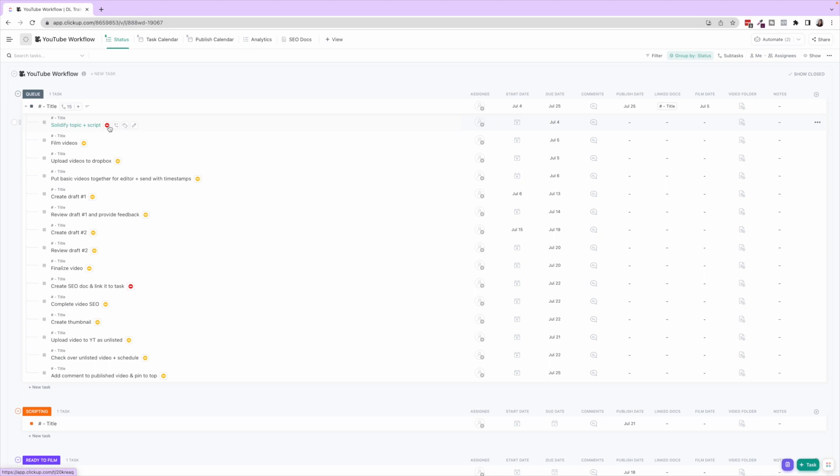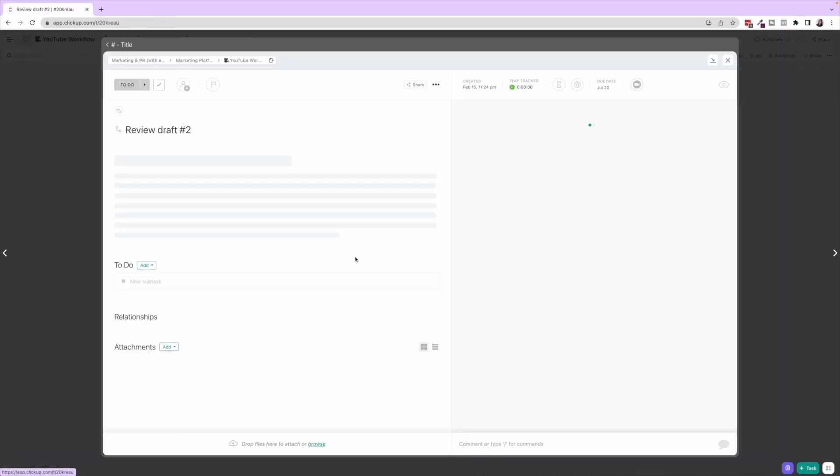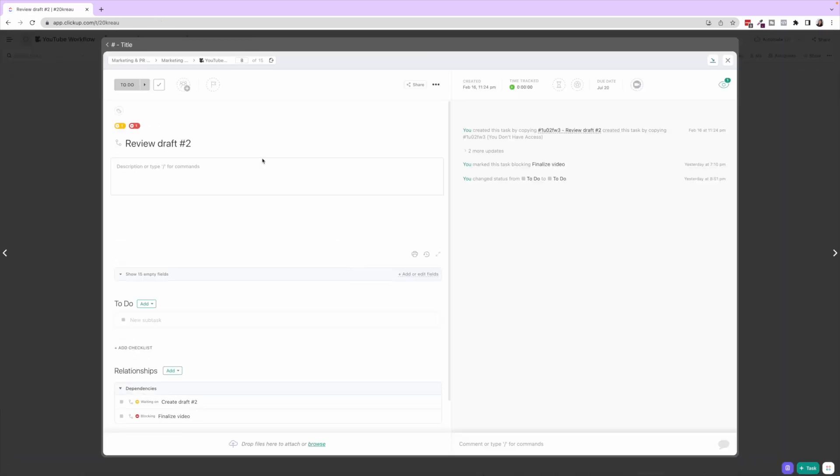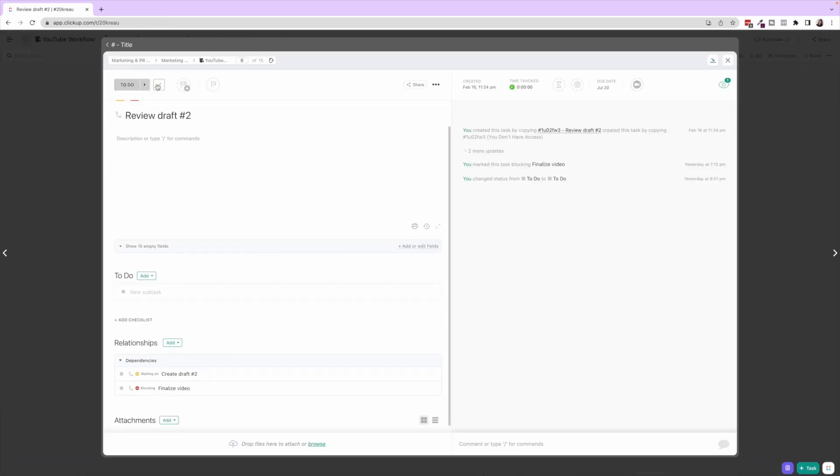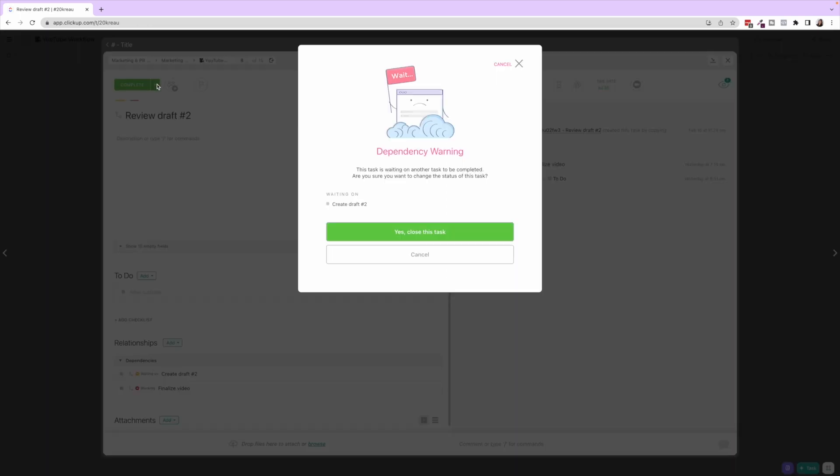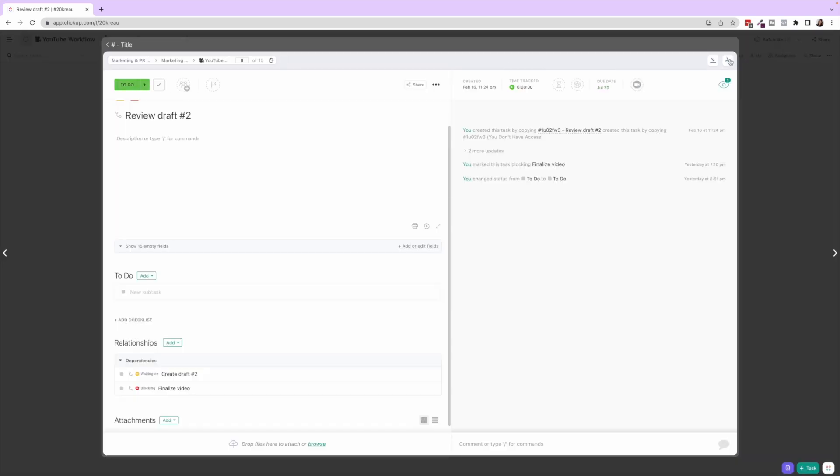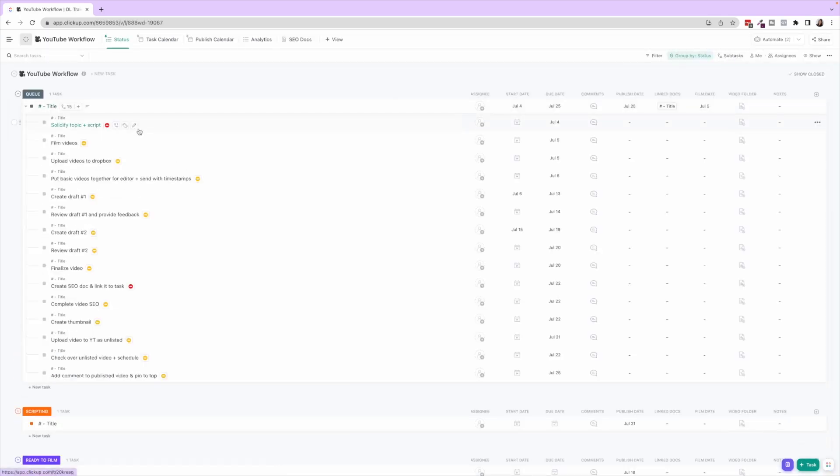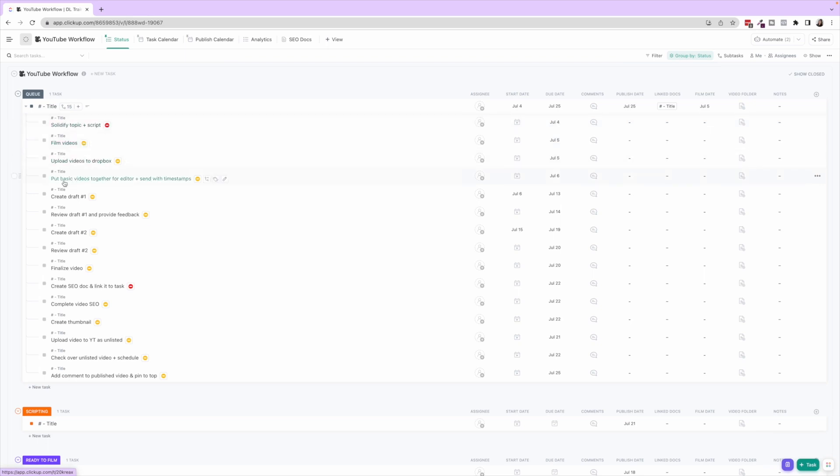I recommend using dependencies when things are a team effort. If something isn't a team effort, you don't totally need them because it's more for say I went to go ahead and it's my turn to review the draft. Well, if I go to mark this as Complete, it's gonna say hold on, you're waiting on Create Draft. That hasn't been done yet, so you actually can't do your part. That's the beauty of dependencies: you are able to see what's blocking or what you're waiting on, check in with that person or just know that you can't do your job yet. As soon as the person ahead of you checks off their task, you're then gonna get a notification saying hey, your dependency has been unblocked, you are able to do your job now.